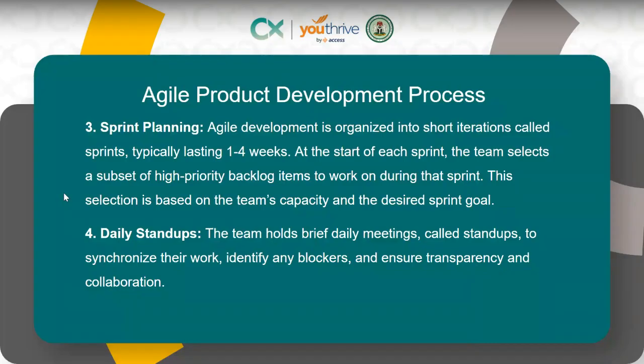All right. So the way the daily stand-up goes is like this. You ask questions such as, what did you work on yesterday, what are you working on today, and if there's any blocker, any challenge you're experiencing, so that you can address it quickly before every day. Because while you're working, you always keep coming up with different challenges, different blockers, or anything that you may experience.